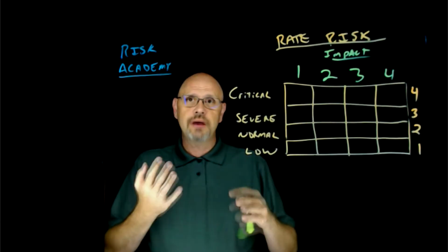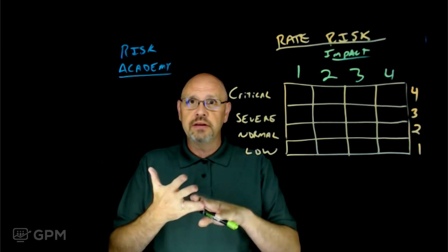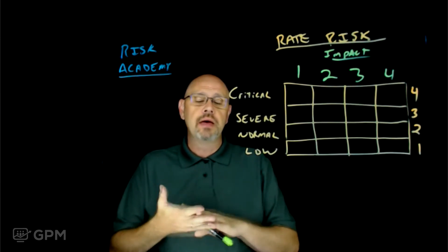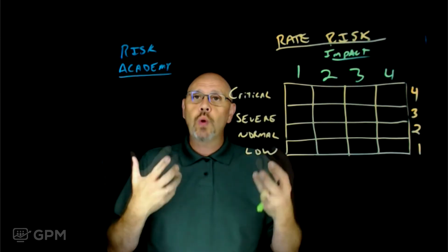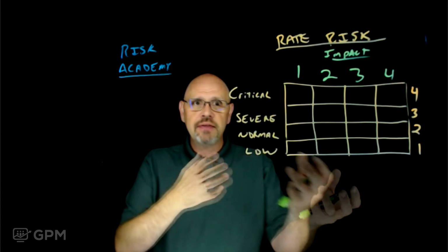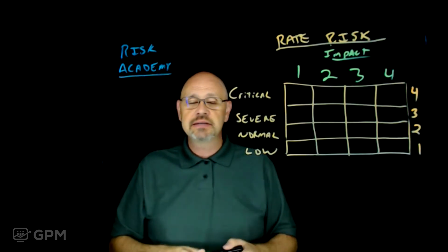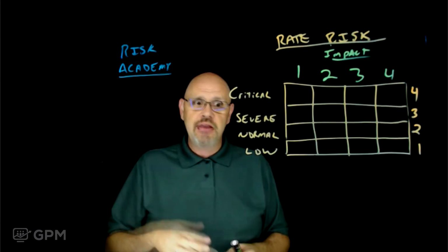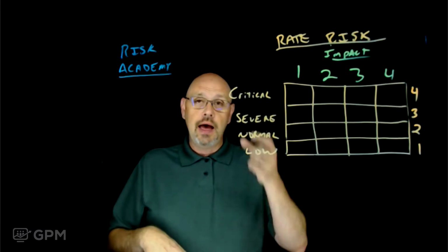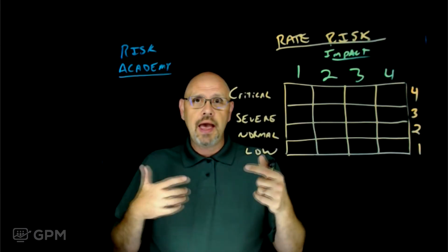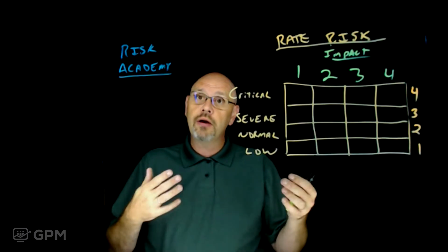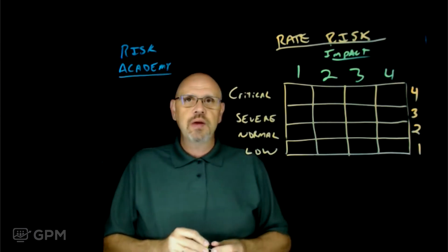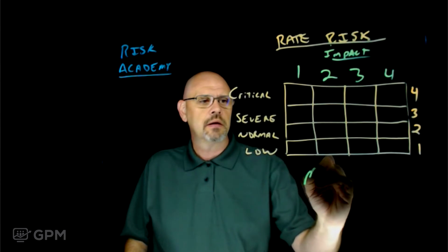All right, so we've gone through our threats and vulnerabilities. We talked about the likelihood and impact. Those are pretty straightforward. So now we need to rate our risk. We've thought about all these different things, and you literally need to rate your risk. For example, it could be that our laptops are not encrypted, and because we travel and we're mobile, they're a theft item. You literally do something called a risk matrix